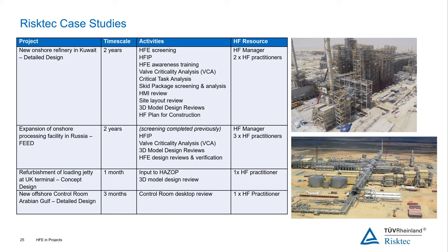HF practitioners. And you'll see there that we did quite a lot of activities. We did the screening and the plan, and then we did various things, skid package reviews, HMI reviews, quite a lot of different activities. And similarly, the second one for the facility in Russia was another 2-year job, which was on the FEED stage. And again, there was a lesser number of activities there, but still a HF manager and some practitioners. And the last two at the bottom will give you an idea of some of the less large projects.